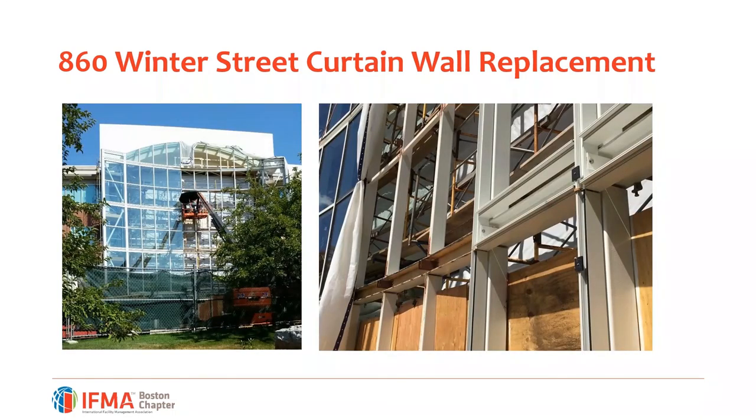This is a pretty good example of what our building looked like for most of the summer of 2016. Our main entrance was completely closed off, and the glass panels were missing from anywhere from 5 to 7 bays of glass at any one time. Each night, Chapman would drape curtain, like tarp curtains down to keep out the water, but the HVAC controls were almost impossible to maintain in the lobby. So it'd be quite warm, as you can imagine, during the summer. Thankfully, we had it completely enclosed by the end of September, so we didn't have to deal with any winter weather.